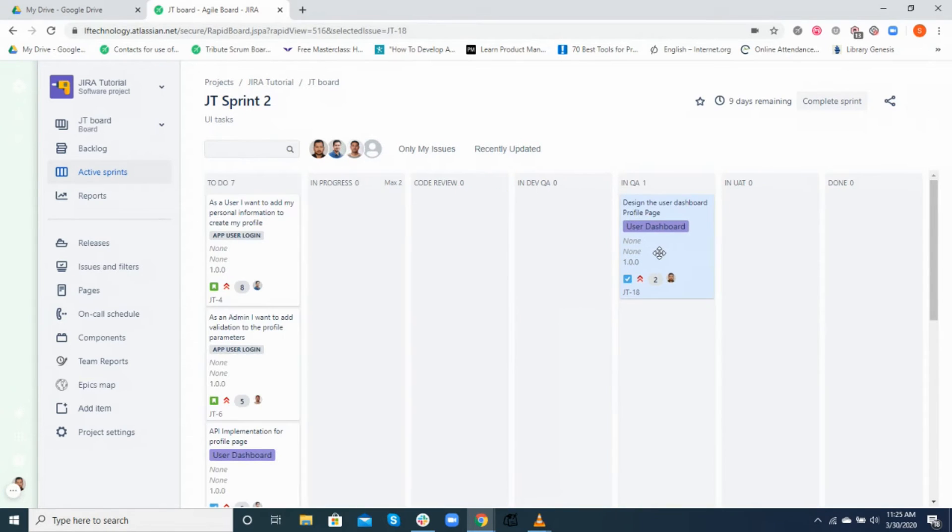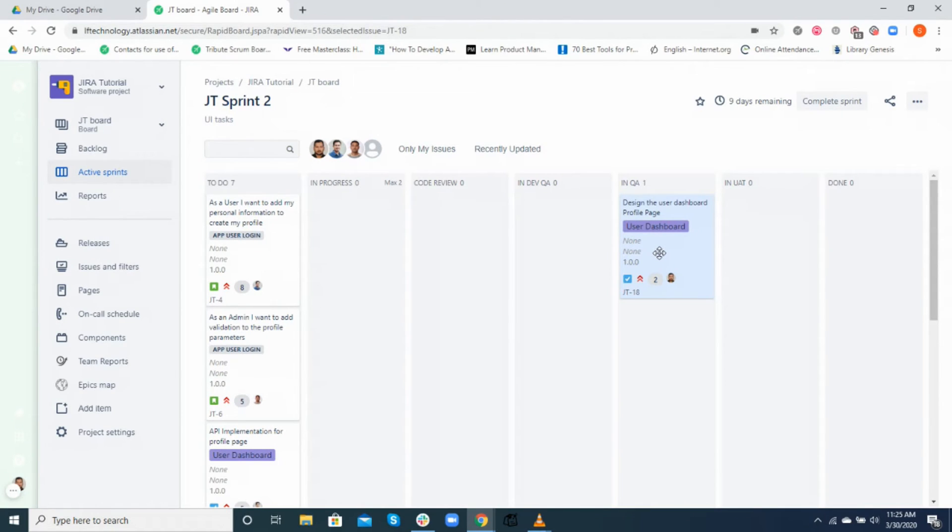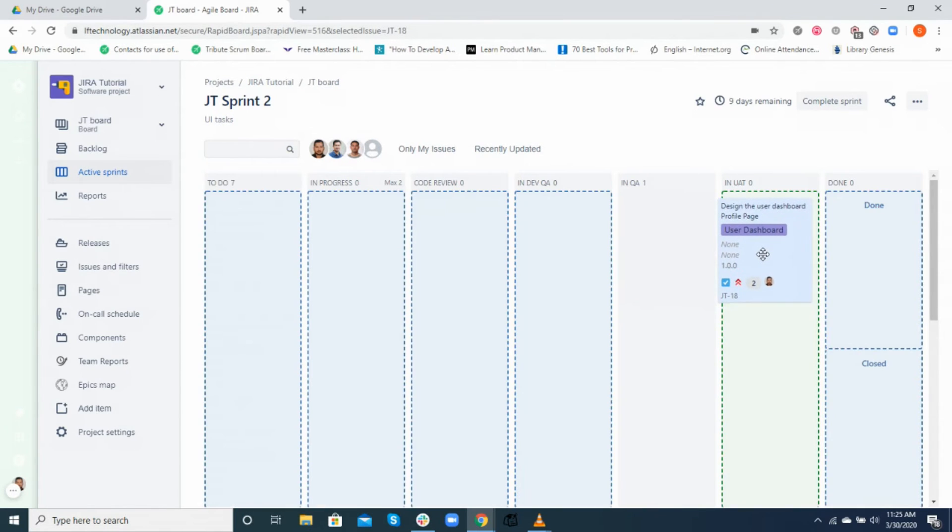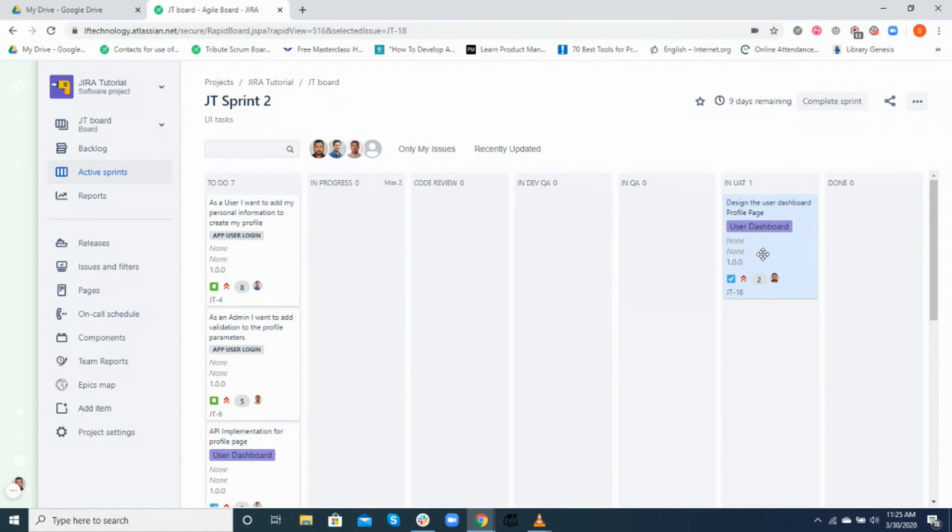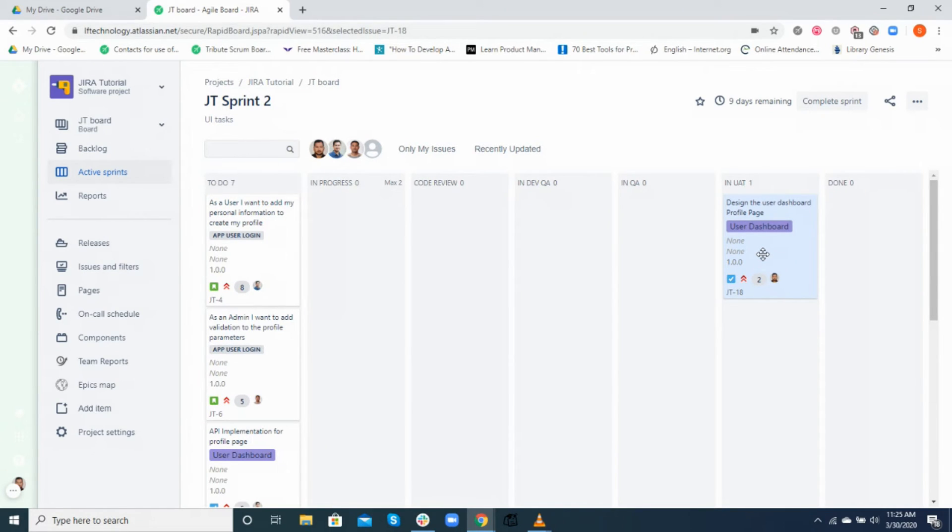Finally, the task is passed over to the QA for final verification. The QA verifies the task or feature based on the defined acceptance criteria and ensures quality by laying down proper test cases and even validating edge cases. Only after the QA's approval, the task is moved from the QA column to the UAT. After a ticket which is here, all stakeholders can test this feature in the UAT environment. Also, after getting the client sign off in the UAT process, the tickets can be moved to done.